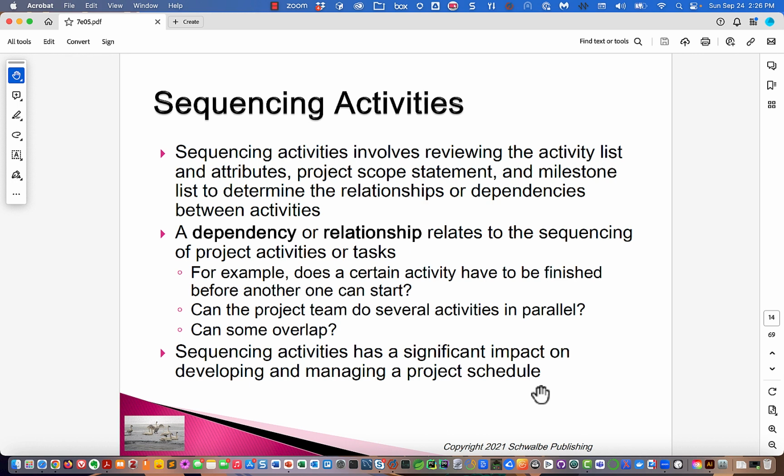Okay. Well, do we have 25 programmers? No, we probably don't. We probably have 5 or 4 or 3 or 10 or something like that. But normally, when we're doing these activity diagramming things, we're not taking our staffing into account. So if we have 25 things that can be done in parallel with each other, we normally diagram such that it looks like they can all be done at the same time.